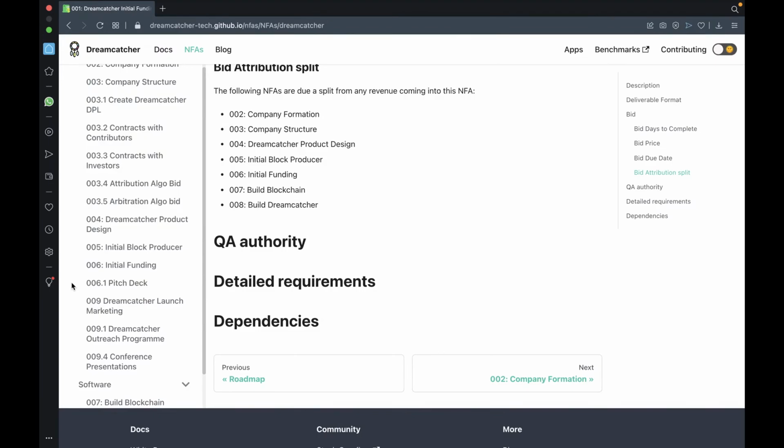Because if no one pointed out that there was a better way, they in earnest expended their precious resources, and you were willing to pay for it. So there's an assessment process where someone needs to assess how much percentage-wise was done, so therefore what's owed. End result is the company got what it wanted. It got it faster and it got it cheaper, so it's not bad for them. But you can leave the worker in the lurch if you pour them out, right?